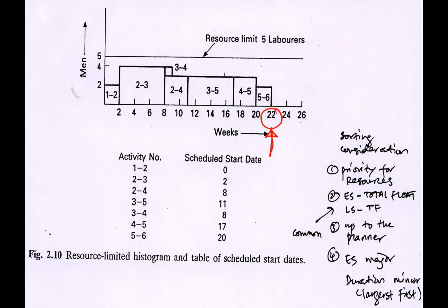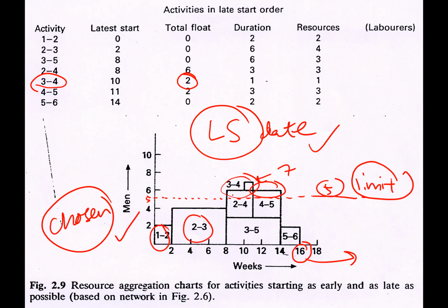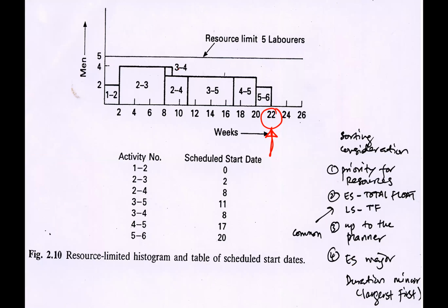You notice this one remains the same, but there are a few activities which have to be prioritized. Then we push activity 5 to the other end. So we meet the objective. What is our objective? We want to limit the resources. That is good, but we sacrifice on the activity completion date, but within the project. You do not say that it is encroaching the contract period.